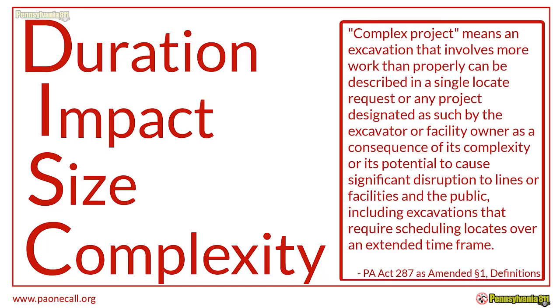A complex project means an excavation that involves more work than properly can be described in a single locate request or any project designated as such by the excavator or facility owner as a consequence of its complexity or its potential to cause significant disruption to lines or facilities and the public, including excavations that require scheduling locates over an extended time frame. By that definition, my job is a complex project.